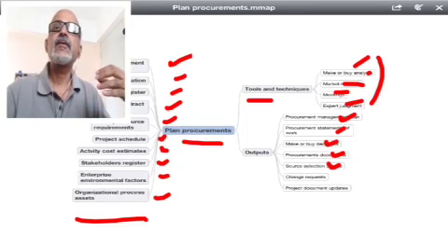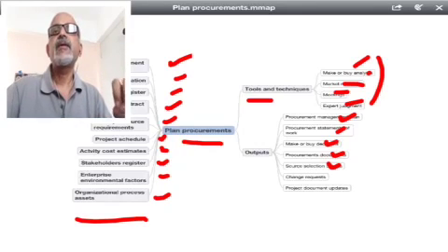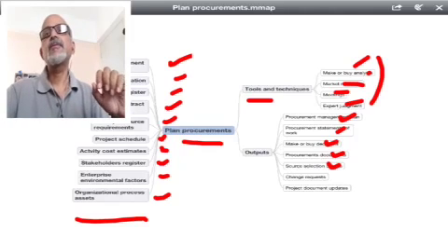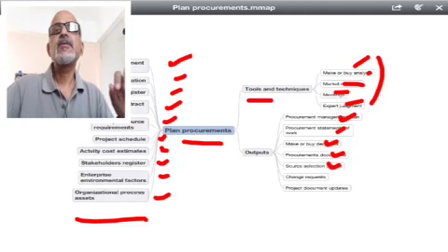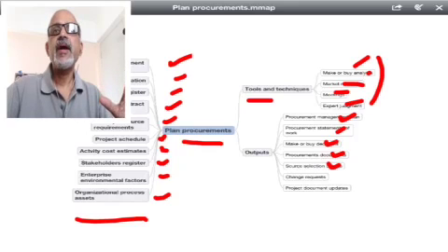Whenever it is a high value procurement decision, mostly it is not done by one single individual. Always we have a procurement team, a team of people who decide based on preset criteria, like for prior experience this much weightage, for schedule this much weightage, for waste disposal norms we give this kind of a weightage.